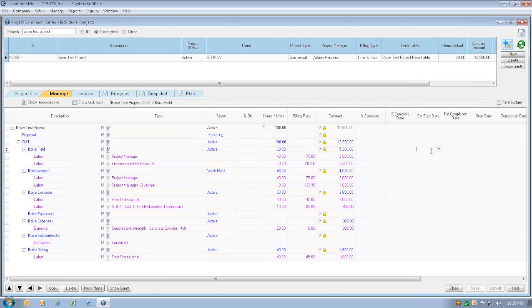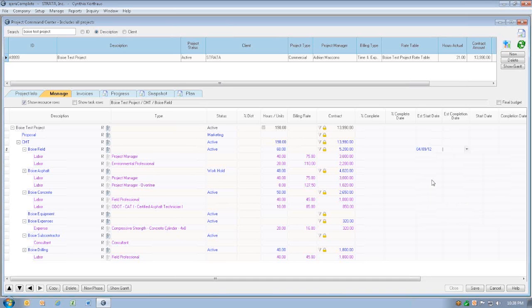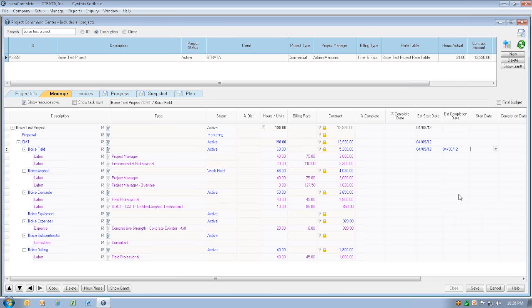For each of our phases at the very least, we're going to fill in a beginning and an end date that we anticipate that phase lasting through. For example, this Boise Field phase, let's say we think it was supposed to start last Monday, and it's going to go for about three weeks, so it's going to go to about the 30th.